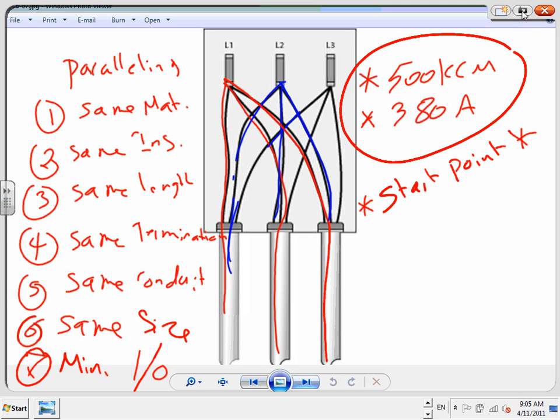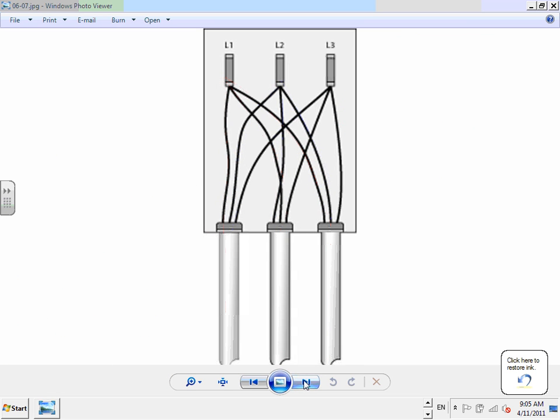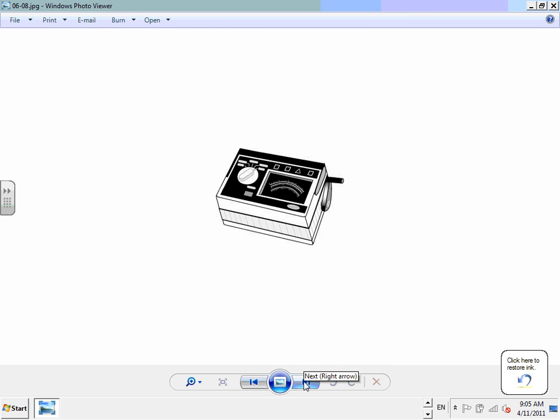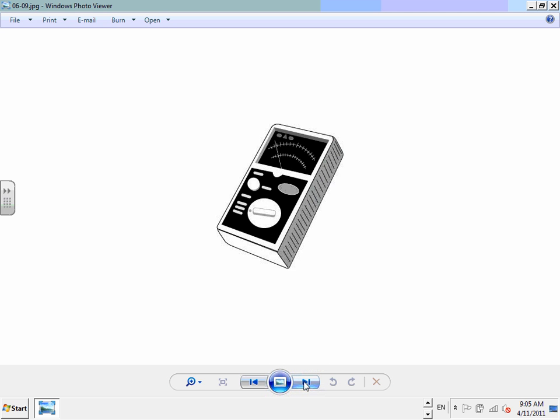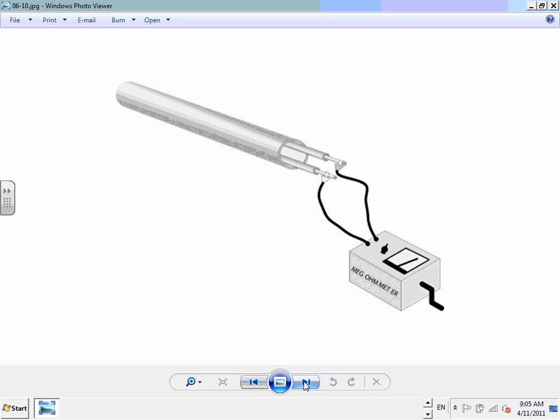The reason why I said that one, if you're in this, you want to pay attention to what I'm going to say next. They have a machine that's called a Megger. This is an old Megger, guys. A lot of you guys would never use it unless you are doing commissioning or you're a project manager on a project. When the project is done, before they energize the 4,000 amp switch gear, they're going to go to a Megger, which measures the impedance.